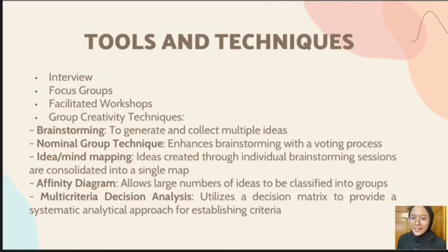The second technique of collect requirements is focus group. This technique is used to get a specific set of stakeholder requirements. For example, we can organize a meeting with executive directors in the company to get their requirements first, and then organize a separate meeting with the functional managers to get their requirements also.